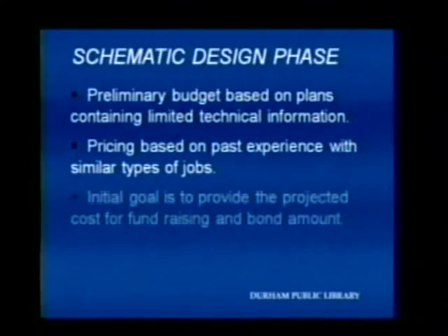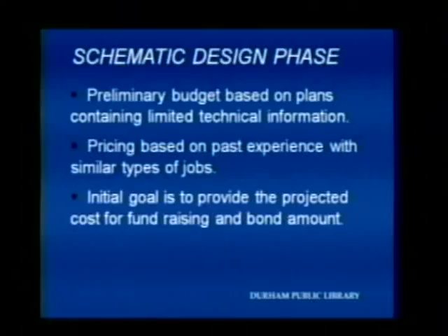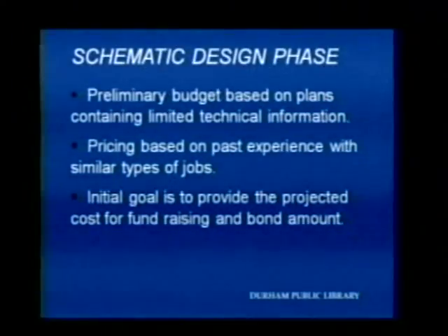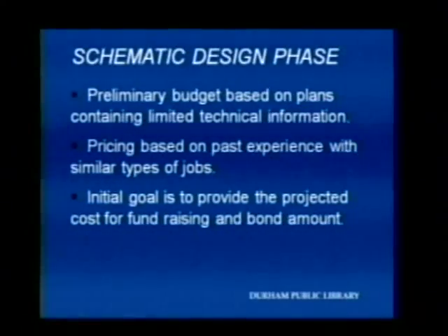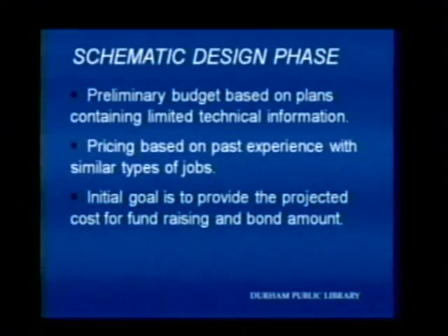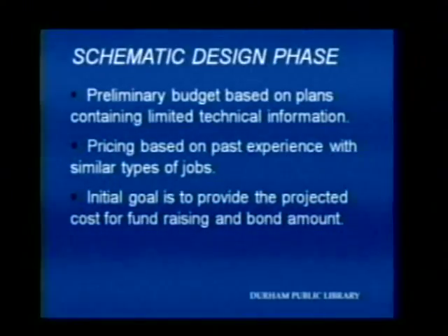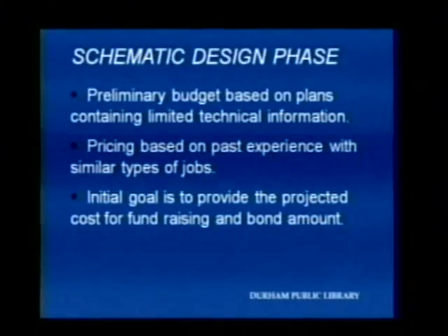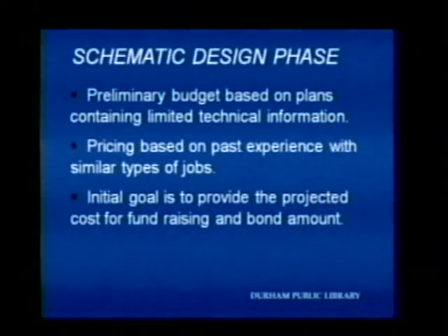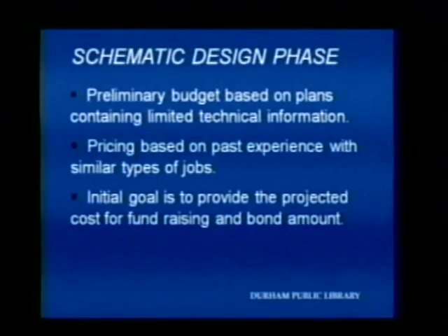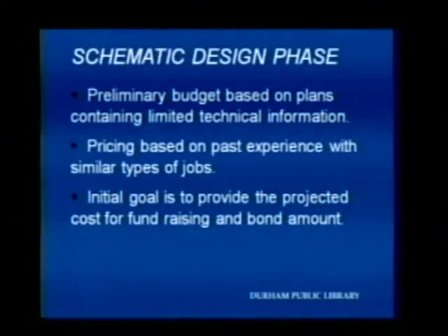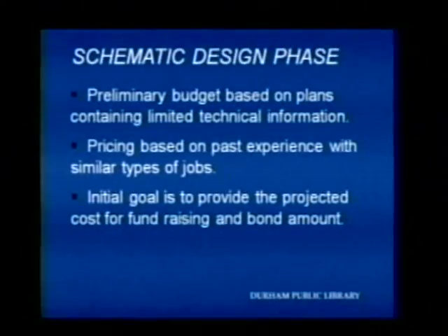The schematic design plans do not have a lot of technical information yet. We don't know how much rebar goes into the footings yet. We don't know what the engineer is going to say for steel size and things like that. We don't know the mechanical systems intricacies yet. But based on our past experience, that's how we start developing the budget. And the initial goal during the schematic phase is to give our clients an idea of what they have to do for fundraising and for bond appropriations.